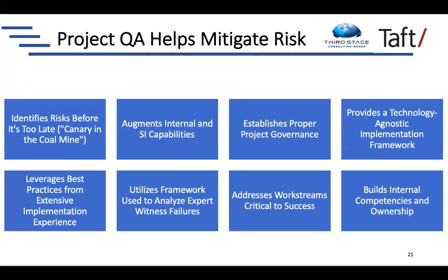But when we look at how we implement QA, or quality assurance, within our overall deployment, a lot of companies don't think about this because you think, well, I'm going to hire the system integrator or the VAR, and they're going to provide the QA. It's typically not the case. Usually they're heads down designing and building and testing software. They're not necessarily thinking about this from a global risk management perspective and identifying risks before they become problems.